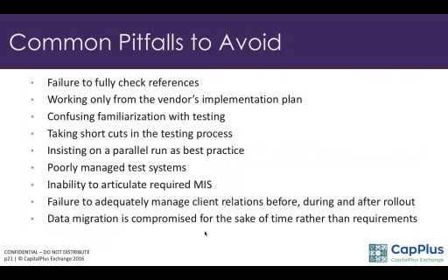Also, usually vendors give a long list of references and just ask for their telephone numbers, and you just pick 3-4 per vendor and call them up, have a list of questions and find out whether they're happy with most of these things or not, right? So these are some of the things that you may have to do.